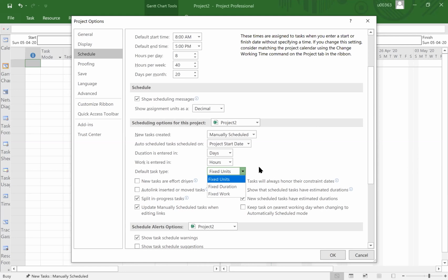First, fixed duration. If you input using fixed duration, and then you will figure out what are the required resources that you basically need in order for you to get the same duration that you set. Normally, you come up with the selection of resources, and then you calculate the duration. That would be, you put the duration.